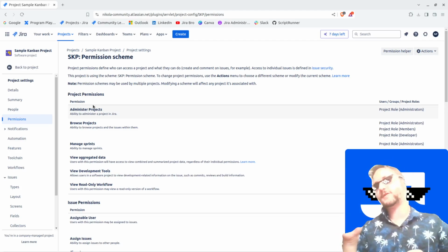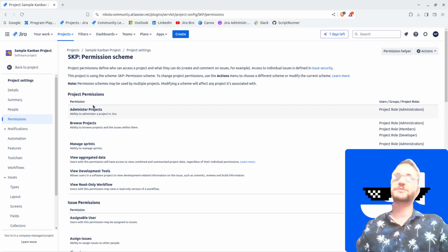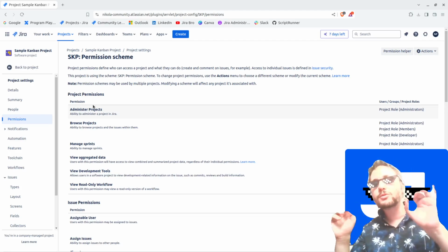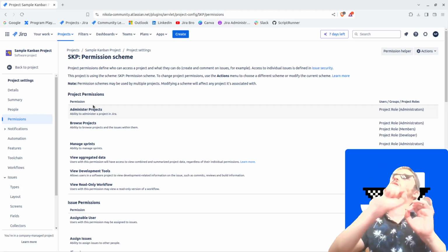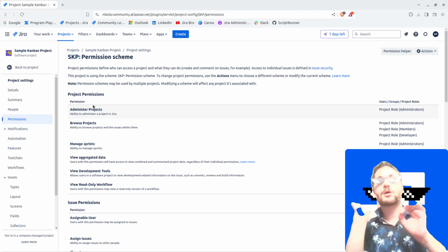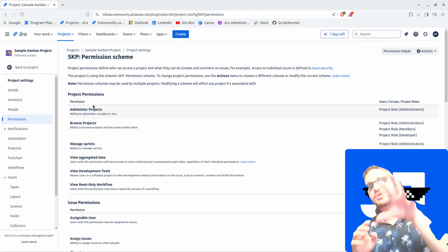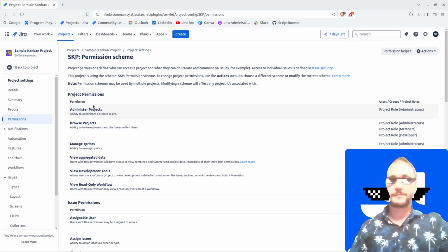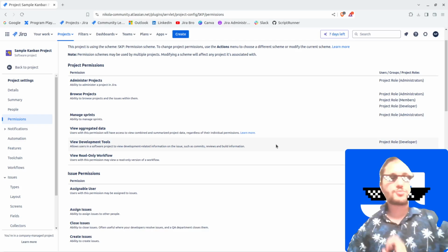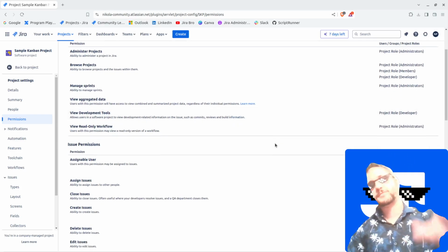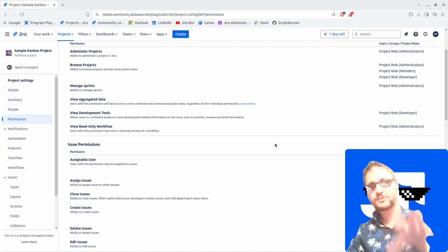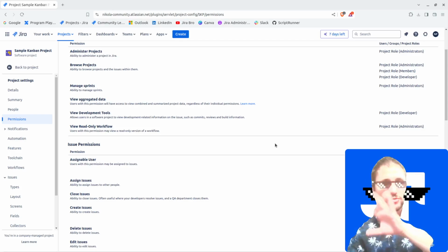But two things, the project key and the project category, okay, so underline this, can only be changed by Jira admins. I'm going to talk about these folks a bit later. So that is what I wanted to say. You want to watch out for who you're giving your permissions to.